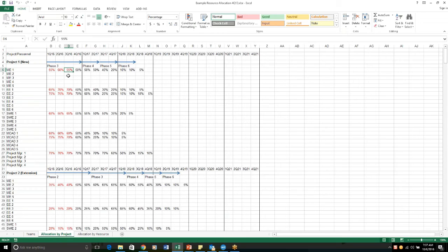It really doesn't matter, in my opinion, whether this person spent 55% or 52 or 58. That's really not the point. I think plus or minus 5% is probably close enough in terms of granularity. You're really just looking at that kind of level. But as a manager, it's really important, because if suddenly this is projected down to 5%, you're going to ask why. Or if it goes up to 90%, you're going to ask why. It's a really nice way to make it visible.